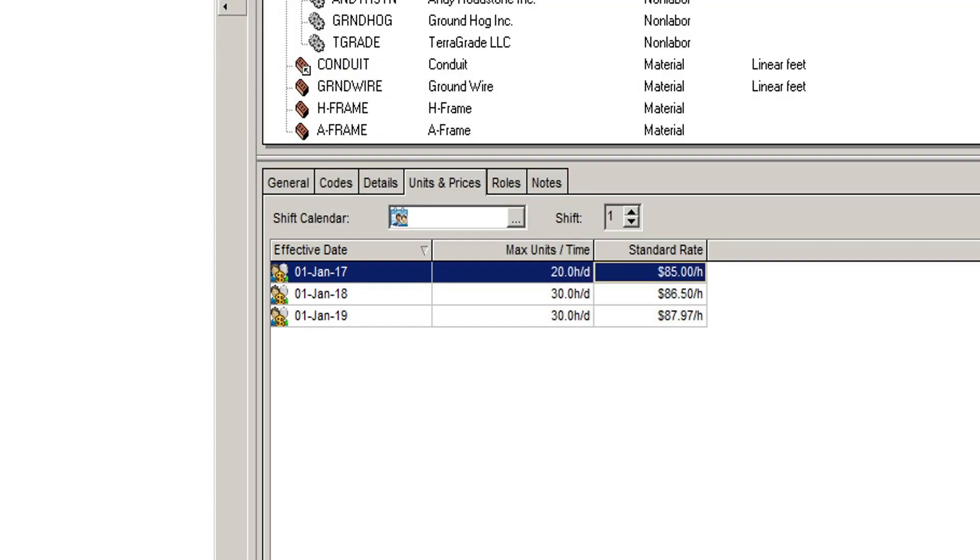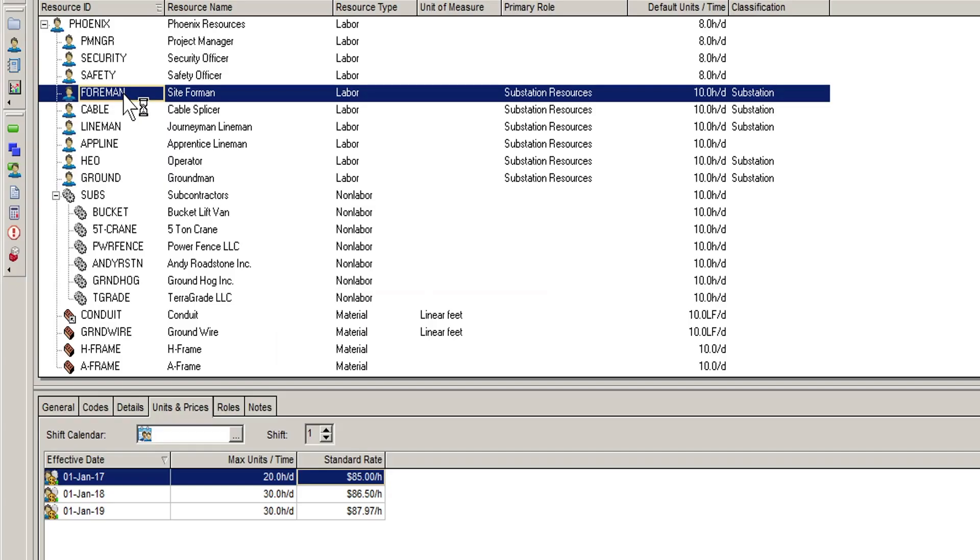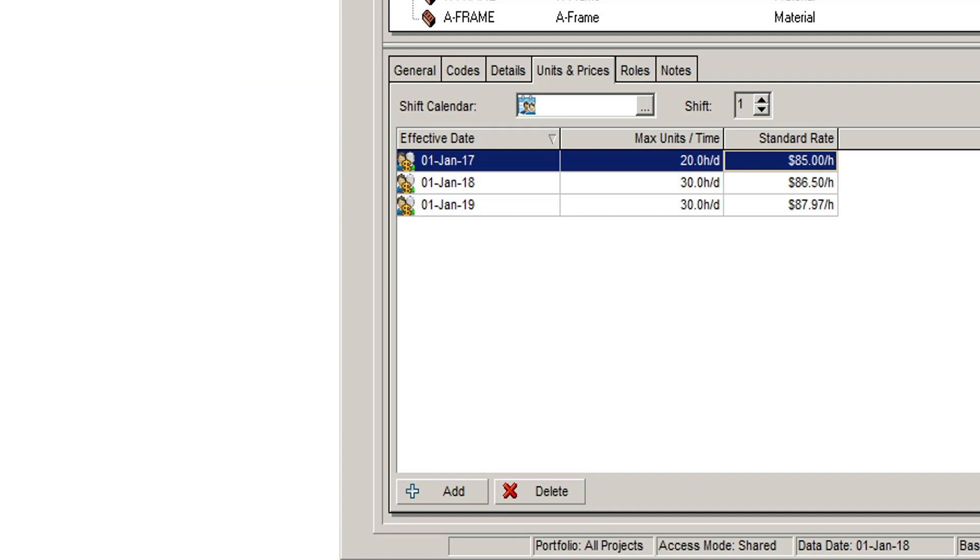You can also see a field here called Max Units Time. This tells P6 how many of a particular resource you have, and this is used to help in capacity planning. For example, we can see that site foreman has a value of 20 hours per day. And because this person works four 10-hour shifts per week, we can tell that in 2017 there are two full-time foremen.